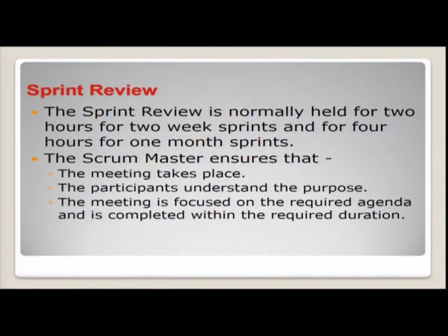Then sprint review meeting. A sprint review meeting is normally held for 2 hours for a 2-week sprint. After completion of a sprint, a review meeting will be conducted. It will be conducted for 2 hours, and for 4 hours if the sprint duration is 4 weeks, that is, 1 month.